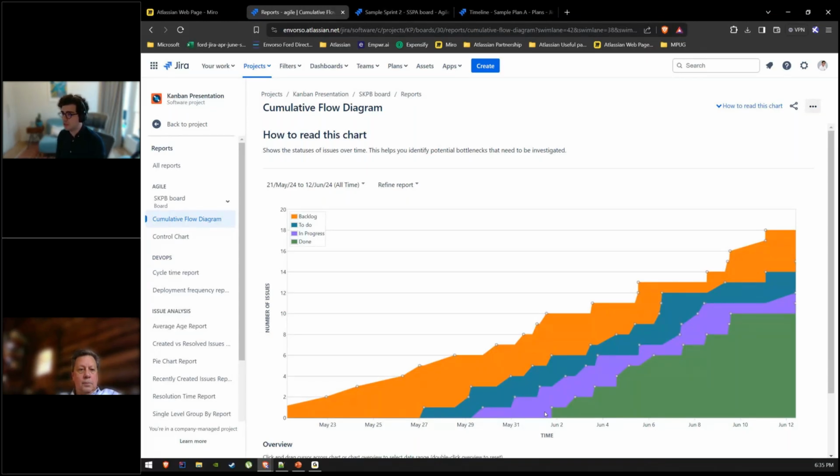If too many tickets are in To Do, that means that as more and more tickets are added to the To Do status, you maybe don't have enough people to address these tickets, and you need more people in the team, or you need to give some trainings to your team, or you need to look at the process, skills. Well, there are so many reasons to look at that scenario.